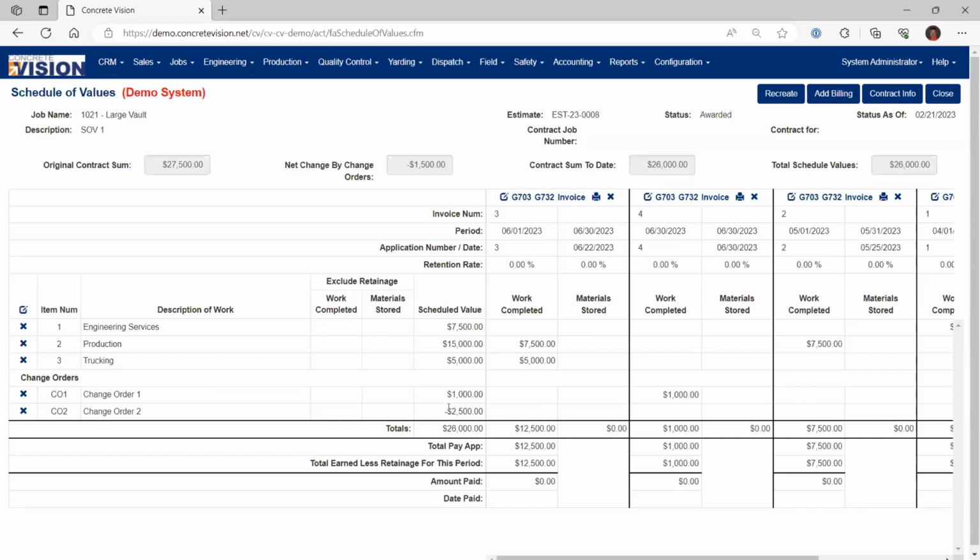So you can put in a positive or a negative. And then again, depending upon how you do the invoice, you wouldn't really necessarily send a negative invoice. You could send a negative invoice or something, but yes, it does allow you to put in a negative amount for your change orders. So the amount columns, it can be positive or negative.